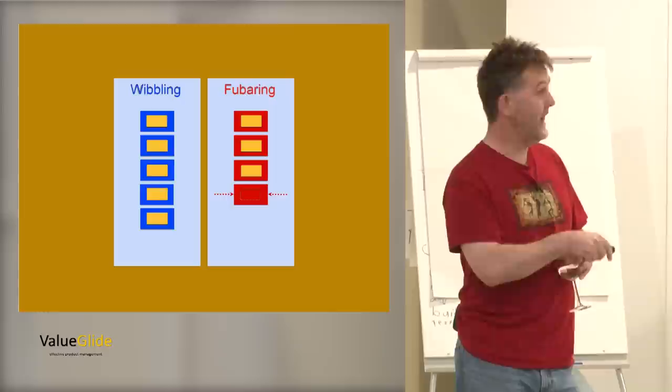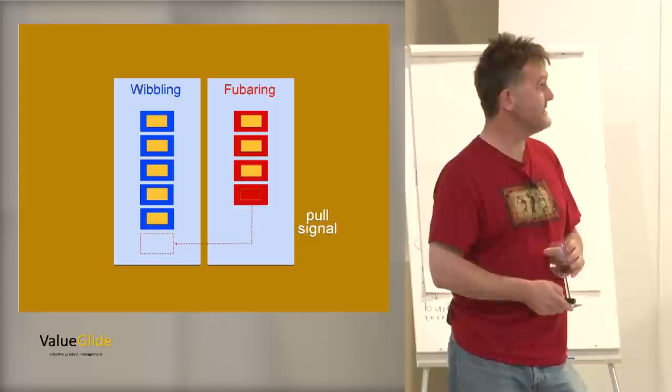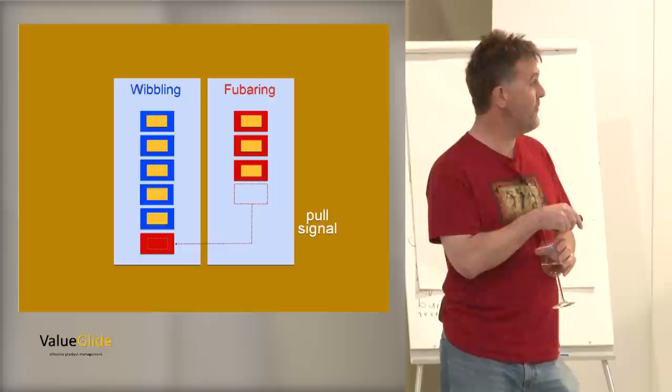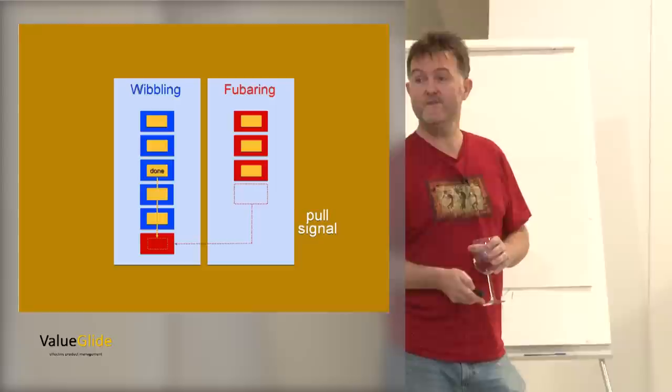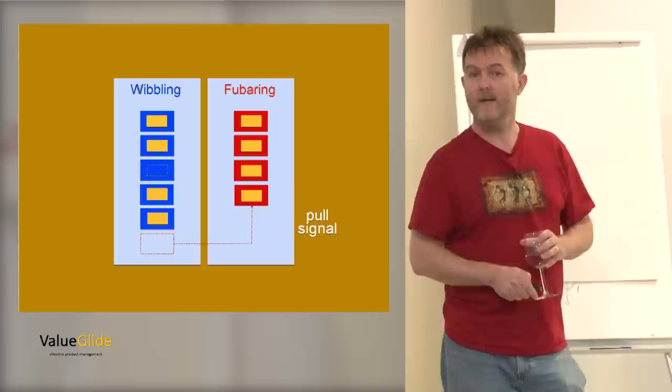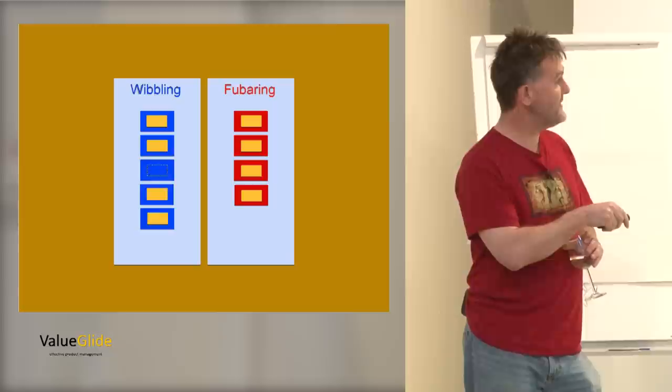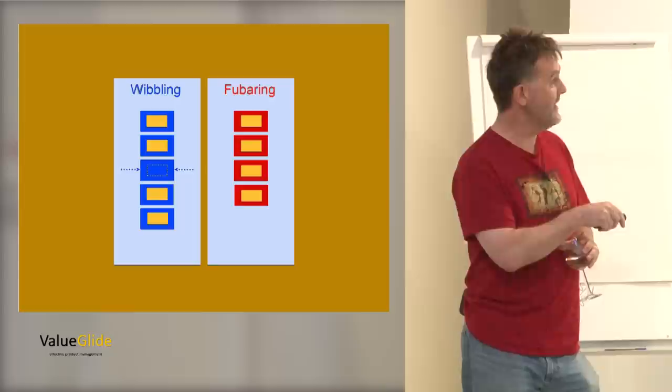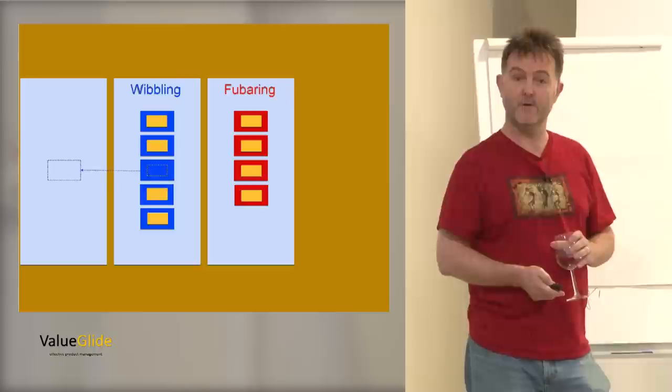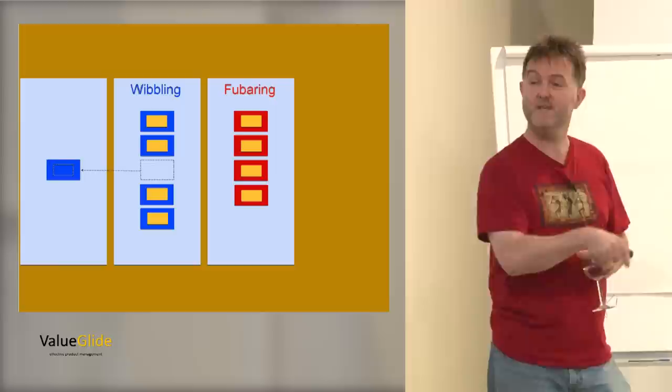As we said, the red column has a spare Kanban. So that's what we're focusing on. They can simply send that to the upstream column to indicate they would like some more work, please. And there it goes. At some point, some piece of work in the upstream process finishes. It's done. In which case, it can move into the empty Kanban, like that, and go back where it came from. That's pull. It's a visual system. It's completely obvious.